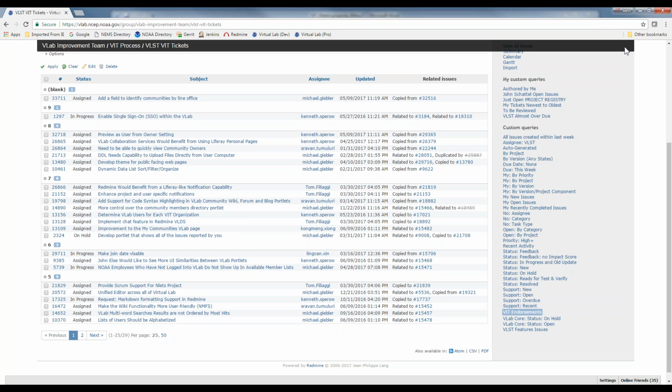After that's been finished, I'm hoping maybe that could be done this week, we can then notify users that a new theme is coming and make that theme available for people to try within their community, I'm thinking a week to 2 weeks at most, and then give them an opportunity, if there are problems within their community using the new theme, to let us know.